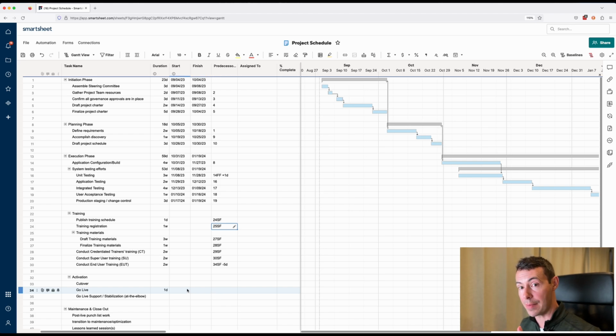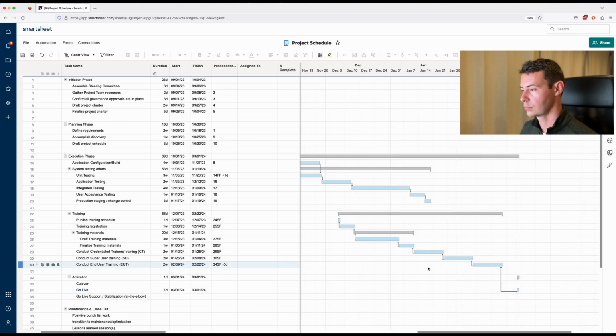Let's once again add a manually set go-live date just to make sure this is working as expected. So we can see we have our stair-step fashion, but again, this is one that we built from the back to the front. In this case, we've got all of our items directly lined up relative to the immediately preceding item, but it's in the reverse order.